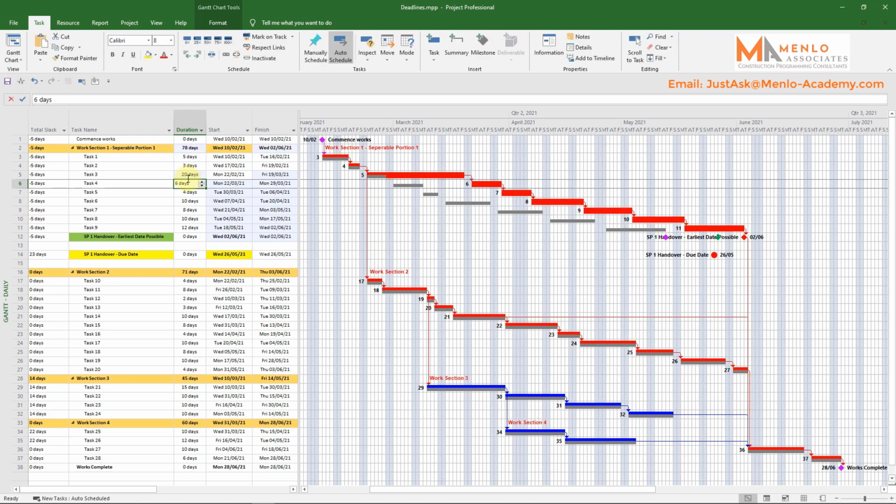You can see the rest of the SP1 workstream gets pushed further to the right, and it actually turns red, which would usually indicate that it's become critical. That said, you can see that the workstream below hasn't turned blue as this one has turned red. They're both red. This is because of the deadline. The SP1 workstream hasn't actually overtaken the main critical path, but in the total slack column you can see I've got a -5 days figure.